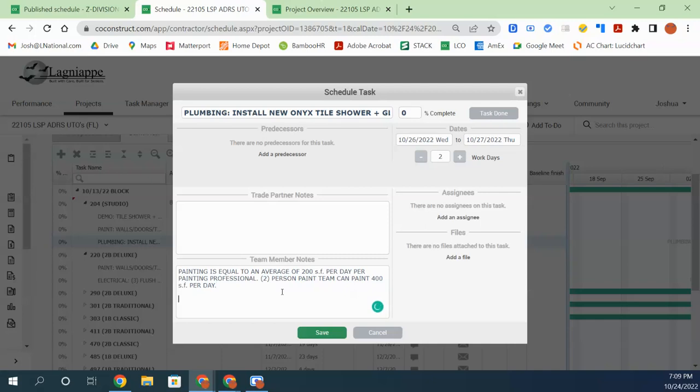So if you've got a project that is 2,000 square feet, therefore the timeline was set for 10 days. That sort of thing. That's what I mean by standard. Your description here is how you based the timeline that you're using, the duration of a task, right?